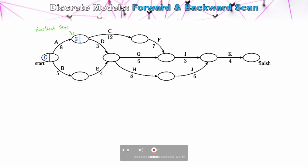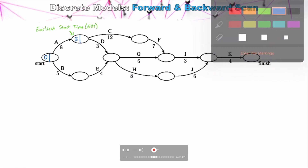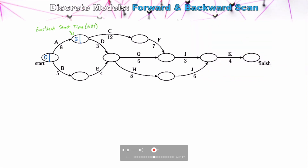You may see the earliest start time abbreviated as EST. This refers to the earliest start time at a particular node, indicating when the next task can begin. For Task E, it requires Task B to be completed, and Task B takes five units of time, so Task E can be started at earliest at five units of time.